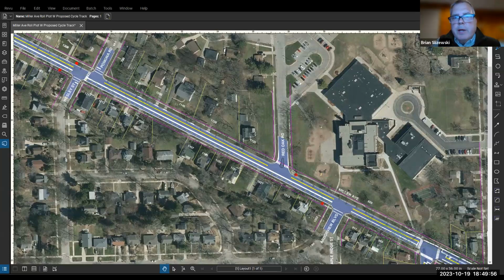Yeah, as part of the design process, we actually have a pretty extensive inventory of the potentially lead impacted services. There are no lead services in the city, but some of the old galvanized water services can be impacted if there was previously lead connections on those. So when we're doing a project, if there are galvanized services, those get replaced by a city contractor. That evaluation is done by Public Services, who actually has a database of that. There are no lead services though.